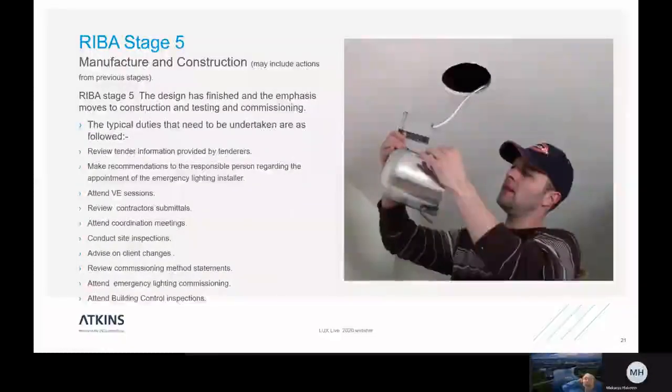Stage 4, manufacture and construction. So if you've now pushed the design onto the contractor to install, it's important to review the tender information provided by the tenderers. If they are offering different luminaires to the ones that you specified, and you may well have said, this is the luminaire I want, or equal and approved.